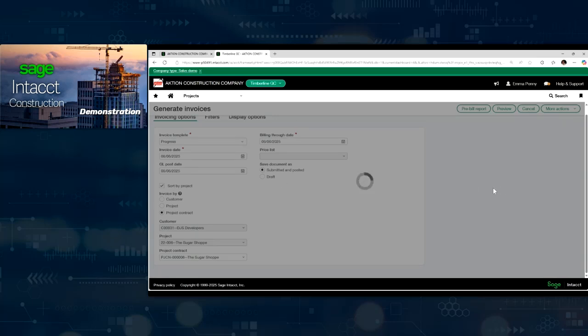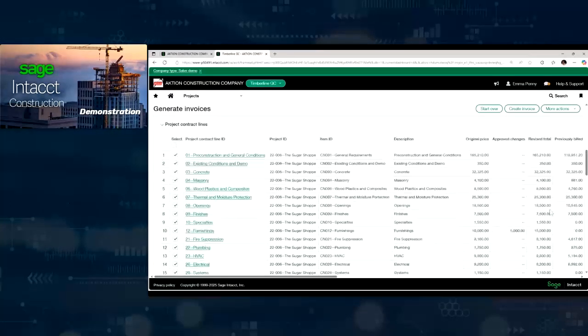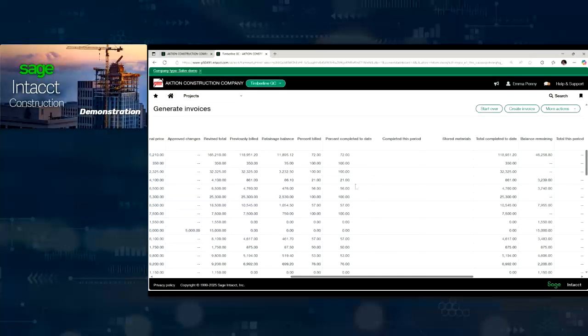The billing worksheet is like either the Excel sheet you're using or maybe some of the programs you're using have this capability. Here's my schedule of values. By the way, the columns are definable, but here's what I've done so far, right? Come in here and say, well, now we're 85% complete. Great, then that's the amount you need to bill. Well, how about I just bill another $2,000 on this line? Great, then you're going to be 107% complete, which obviously we can stop, guys, but you do have the capabilities here.